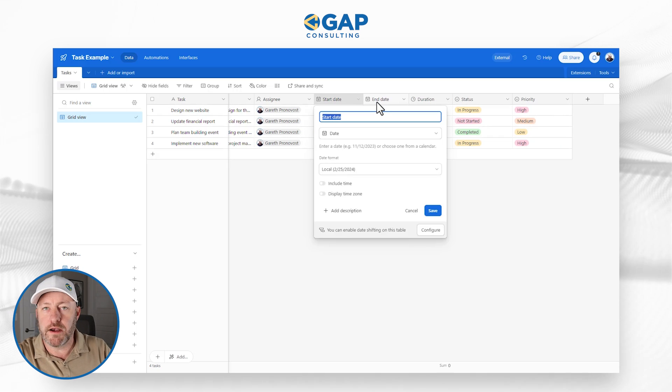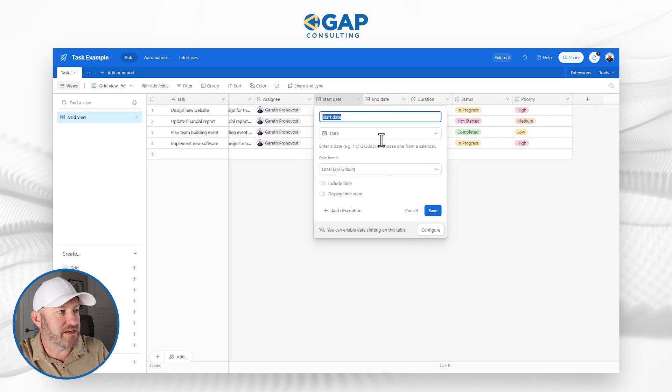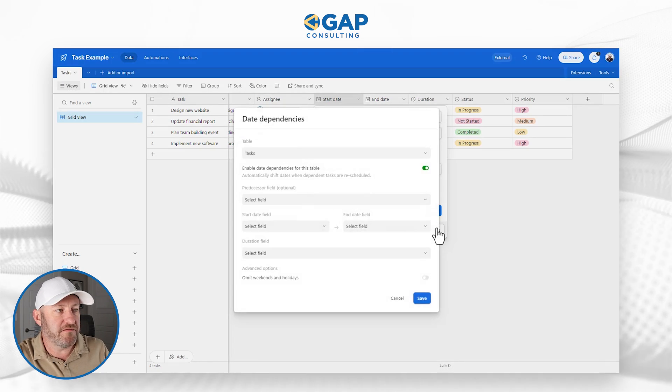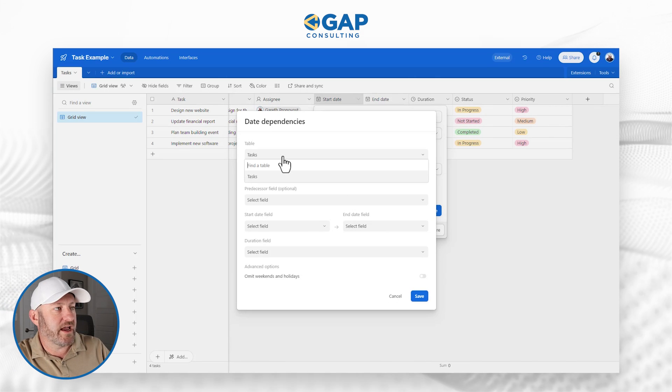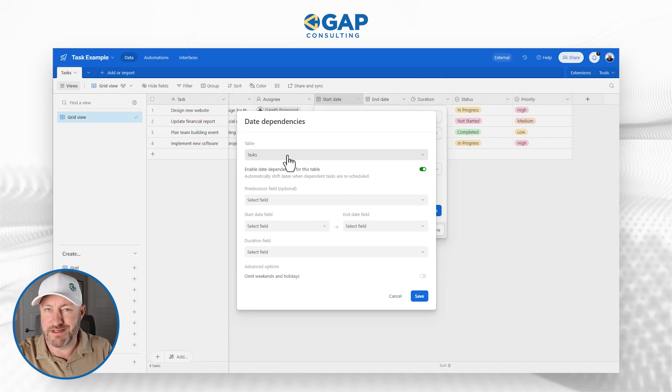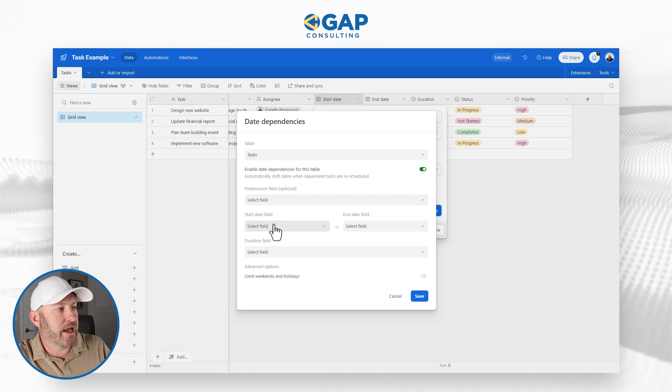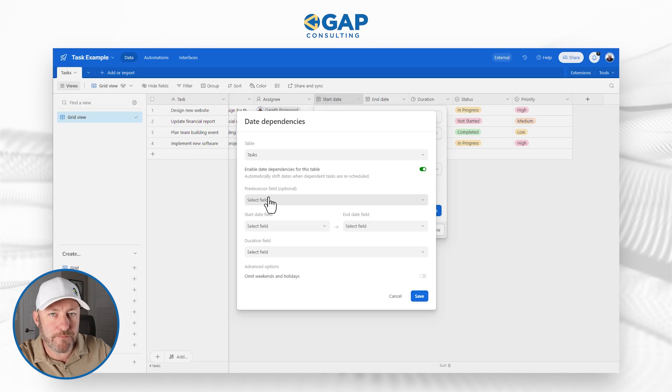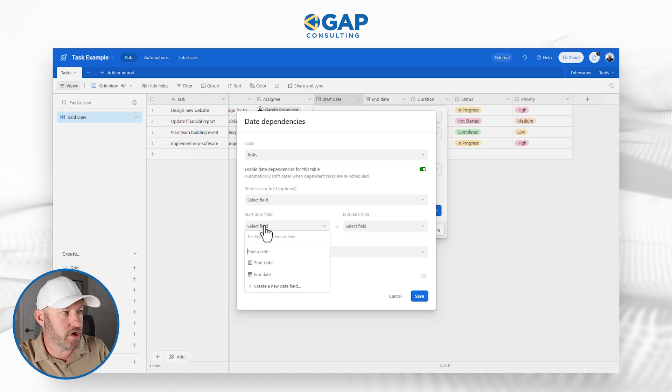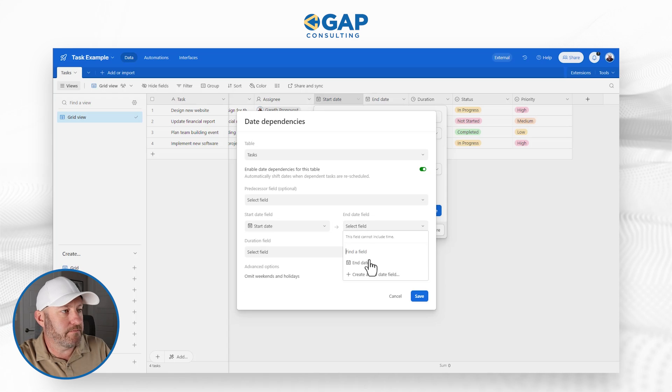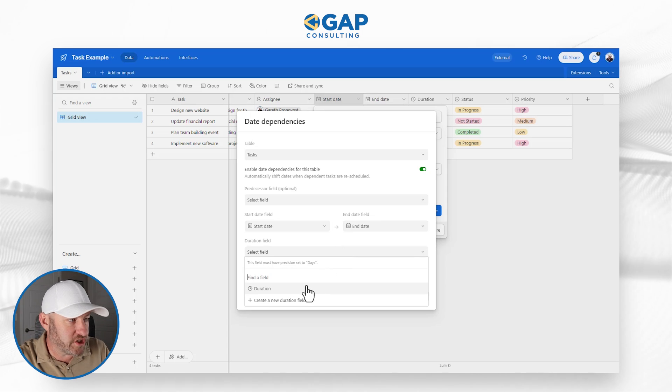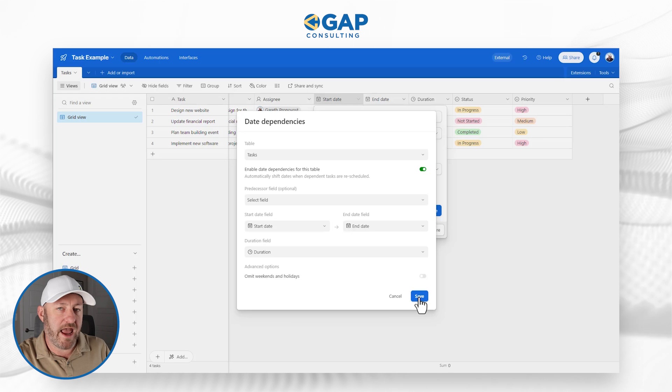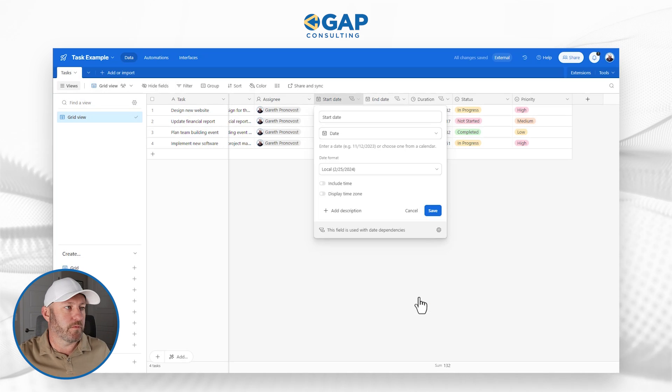So let's toggle this feature on and get it buzzing up. All right, so click on any of these dates again, in this case, my start date, and I'm going to go back to configure my date dependencies. You'll notice that I get a choice of the table, of course, it's in my tasks table here. And I'm going to as I said, come back to the predecessor. So first, pick my start date, here it is. Second, pick my end date, here it is. And lastly, pick my duration, easy enough, and we save that simple, right?